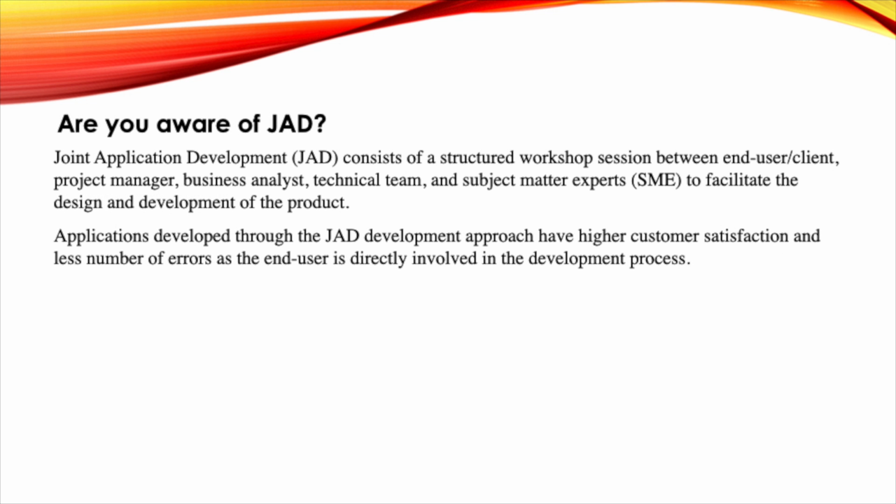Are you aware of JAD? Joint Application Development, JAD, consists of a structured workshop session between end user/client, project manager, business analyst, technical team, and subject matter experts, SME, to facilitate the design and development of the product. Applications developed through the JAD development approach have higher customer satisfaction and fewer errors as the end user is directly involved in the development process.